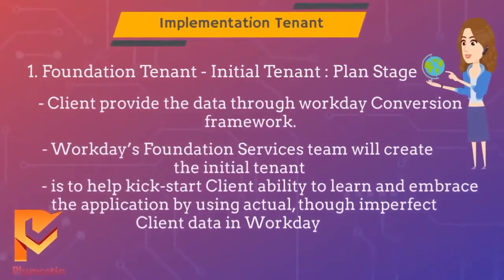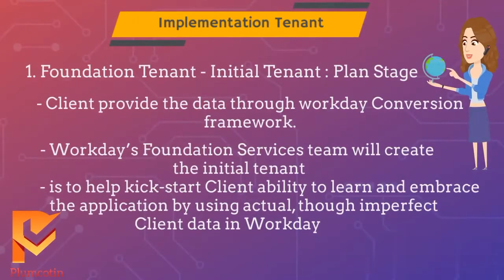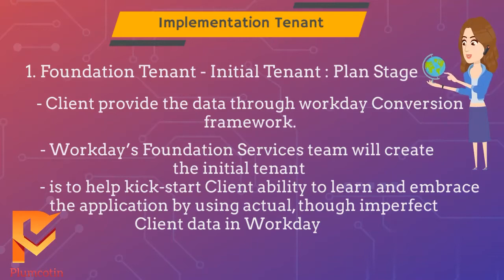Foundation Tenant - Initial Tenant. Deployment starts with the creation of a Foundation Tenant. To deliver the initial tenant, client, implementation partner, and Workday will confirm detailed discovery information provided by client. Client provides the data through Workday conversion framework for initial load and Workday Foundation Tenant. Workday's Foundation Services team will create the initial tenant and deliver it to the client team's AMP implementation team for further configuration and business process design. The objective of the Foundation Tenant is to help kickstart the client's ability to learn and embrace the application by using actual though imperfect client data in Workday.